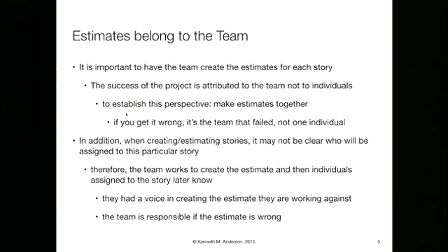In addition, when creating and estimating stories, it may not be clear who will be assigned to a particular story. So what you want to do is to imagine the story being worked upon by anyone. Everyone has a chance to voice concerns about this particular story, and so they know that they'll have had a place to have provided their input. No, I really think this should be a 4-point story, guys. I don't think it's going to be as simple as what you're saying.